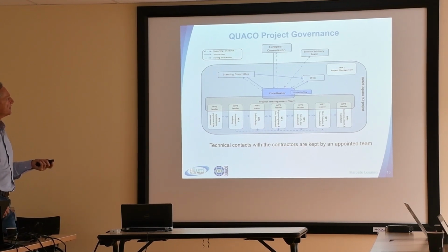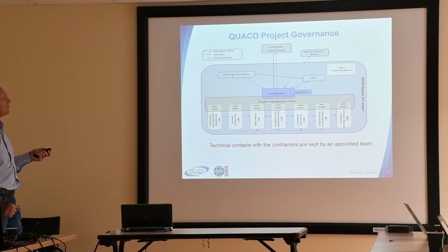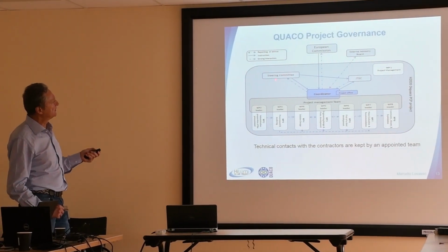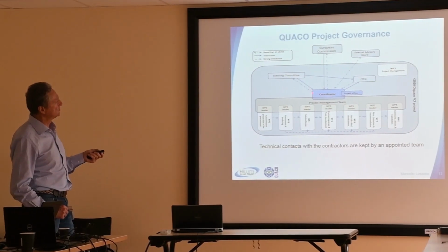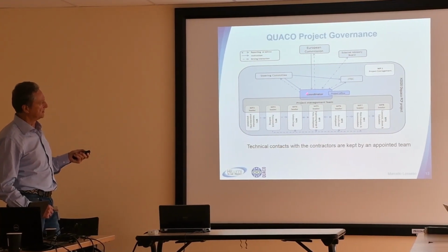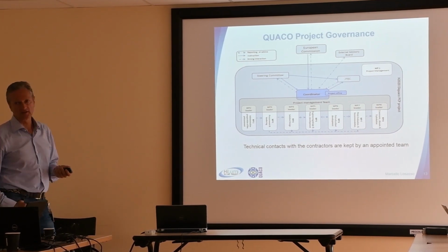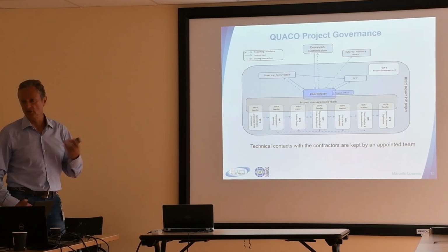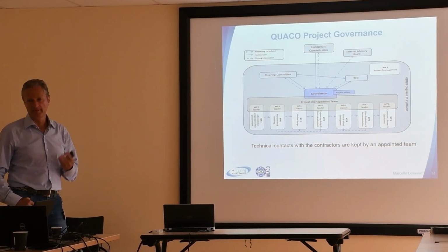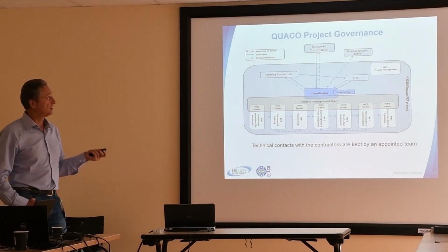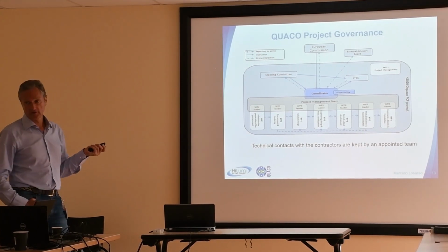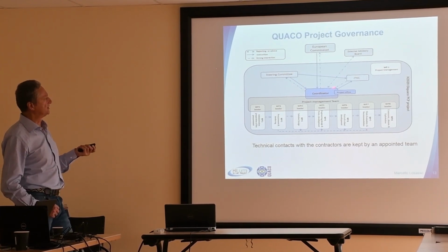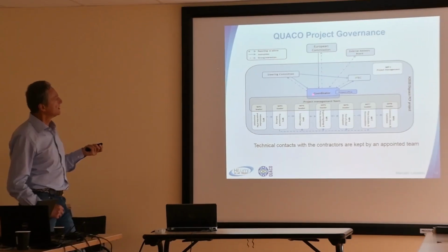But what I would suggest, especially, is that you try to avoid a steering committee that is above the coordination action. Why? Because if you have to take a decision, you cannot have a steering committee that meets 1 or 2 or 3 times per year. It makes things very slow. At the beginning, we were using it a lot. At the end, they practically delegated most of the decisions to the coordination.